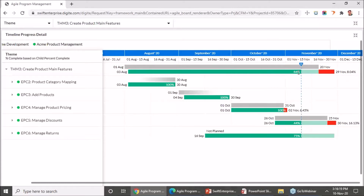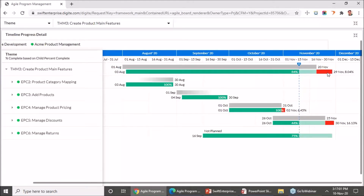To date, the percent progress has been 84%. Whenever the progress made by an item is more than 25%, we use that to extrapolate and identify what date it will be done by. In this case, if it has taken about three and a half months for the item to reach 84% complete, we calculate how much time will be required for the remaining 16% to get completed. We derive the predicted end date in that manner and show it as part of the visualization. The planned date is 20th November and the predicted end is 29th November, if the team continues to work at this rate.